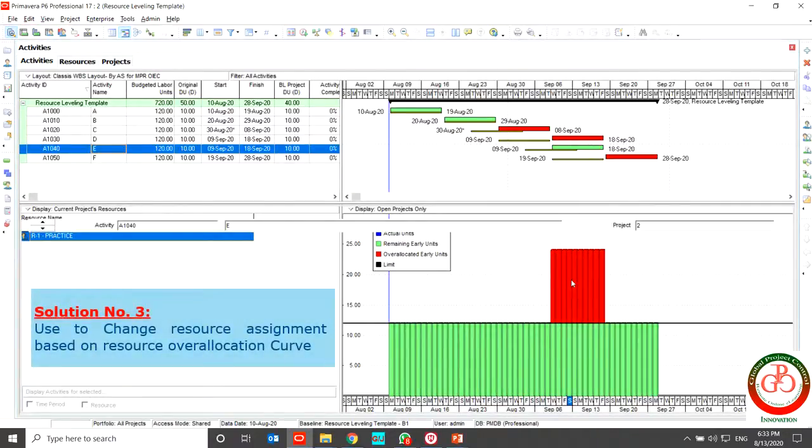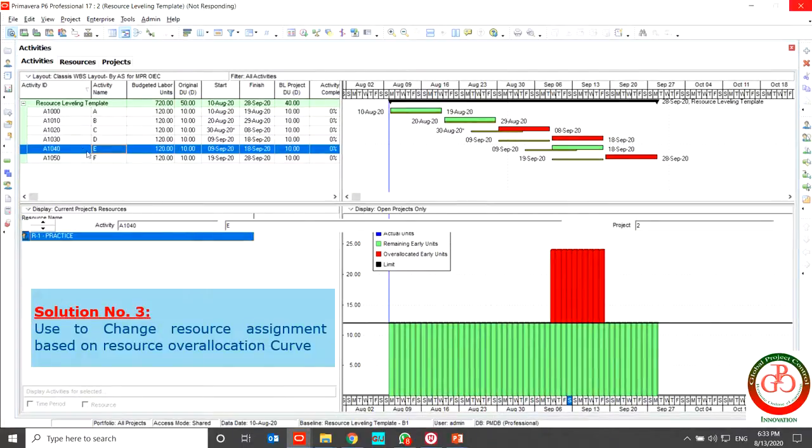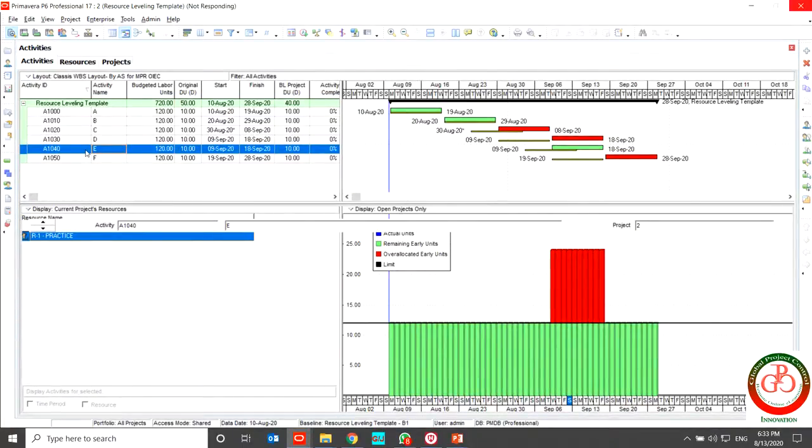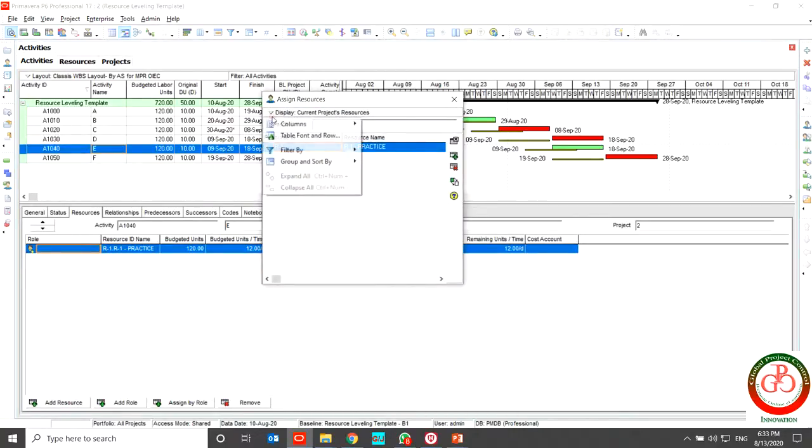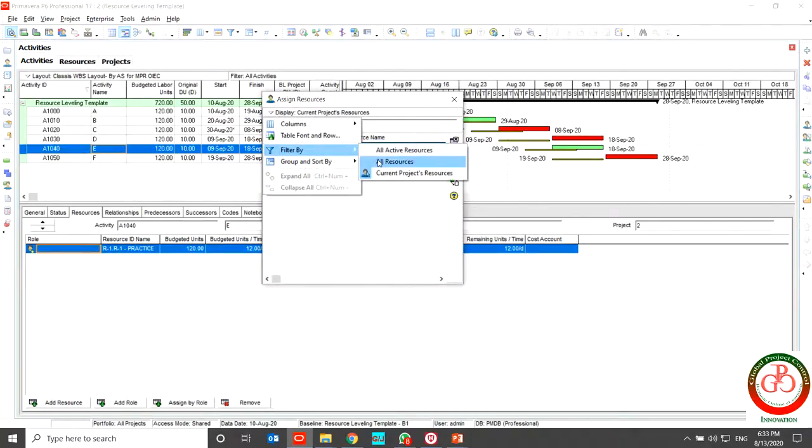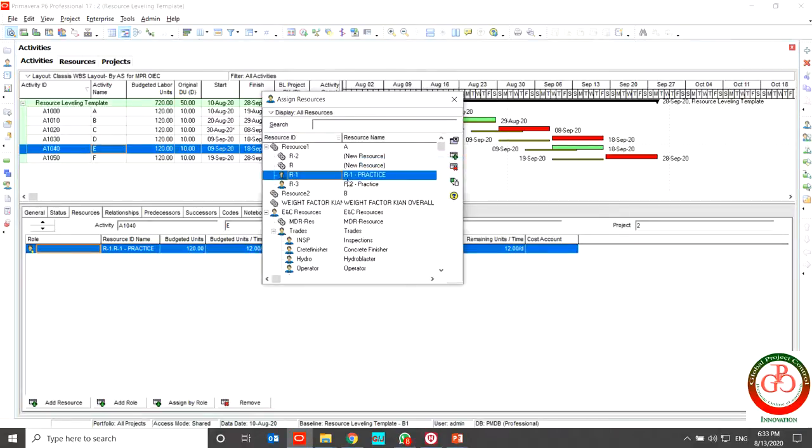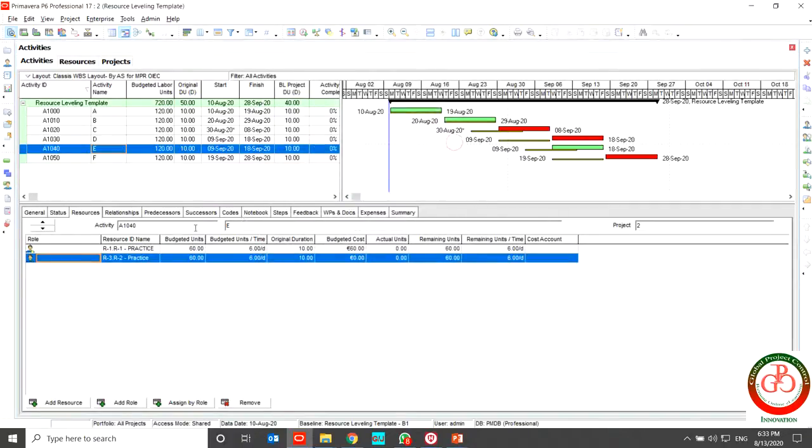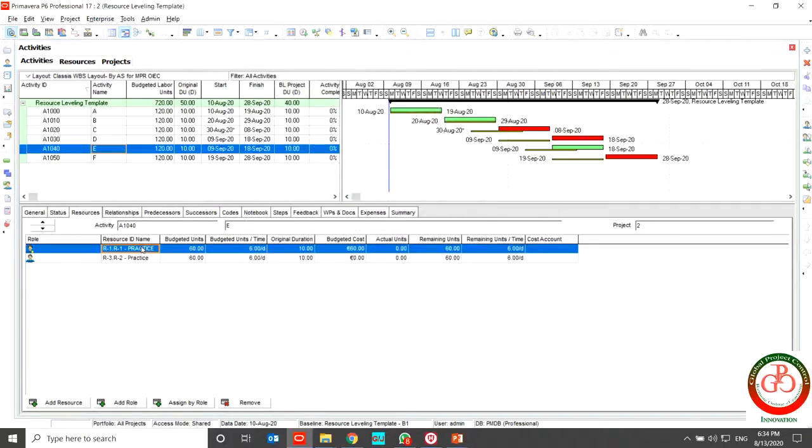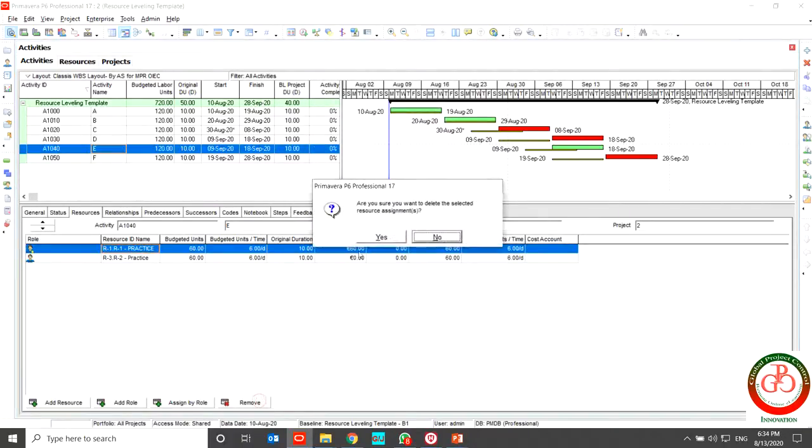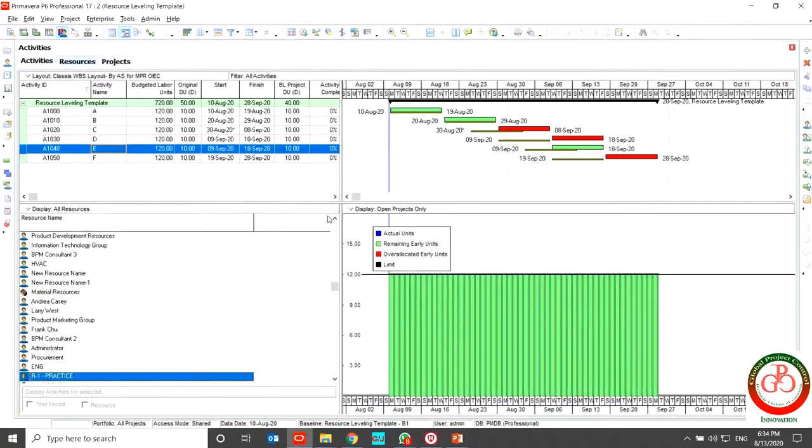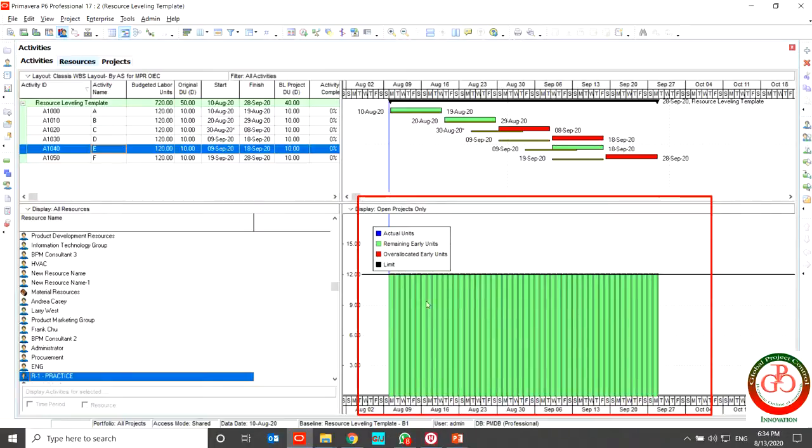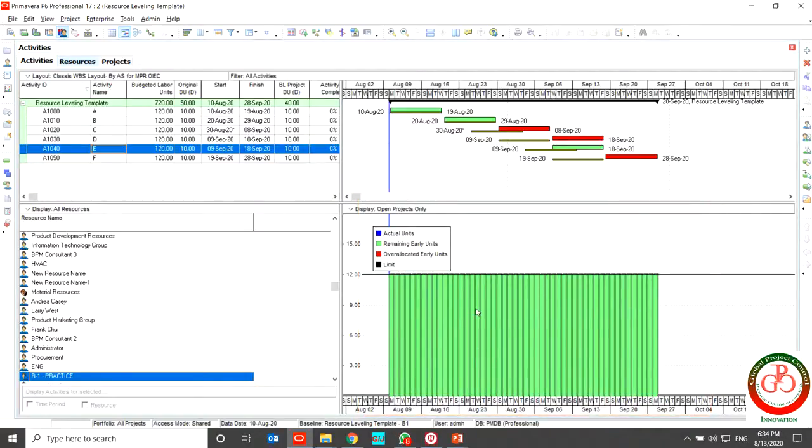So I'm going to activity sheet and assign another resource to my project. This is my suitable resource. And I remove the previous one. So if I'm going to my resource overallocation, my resource usage profile, I cannot find any overallocation on the chart.